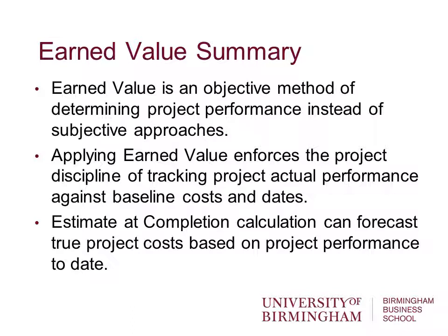So earned value is an objective method of determining project performance instead of more subjective approaches like using baseline Gantt charts. It enforces project discipline, tracking the project's actual performance against baseline costs and baseline schedules. The estimate to completion calculation can forecast the true project costs using the project performance to date. Okay, so earned value, really powerful tool to understand what's going on.